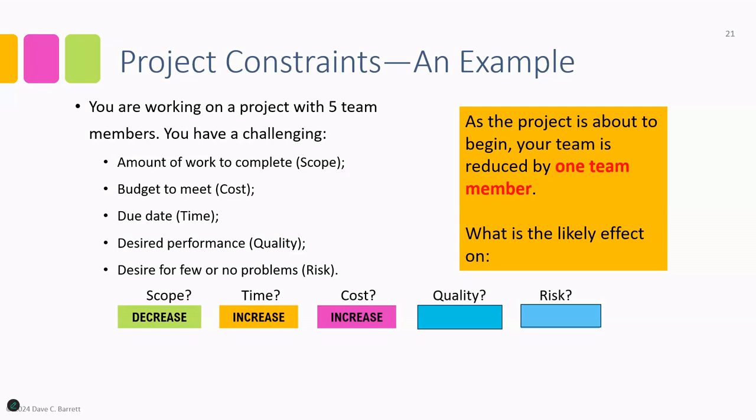Okay, let's reset it one or 2 more times. Reset to say, nope, the project sponsor says, I want the same scope, same deadline, no increase in budget. What could happen to the quality if the team lets it? Well, the quality could decrease. So the team starts to cut corners, starts to reduce the amount of verification that is done, puts less focus on the quality, and the end result could be a decrease in the quality. That's where the quality constraint will start to be affected.